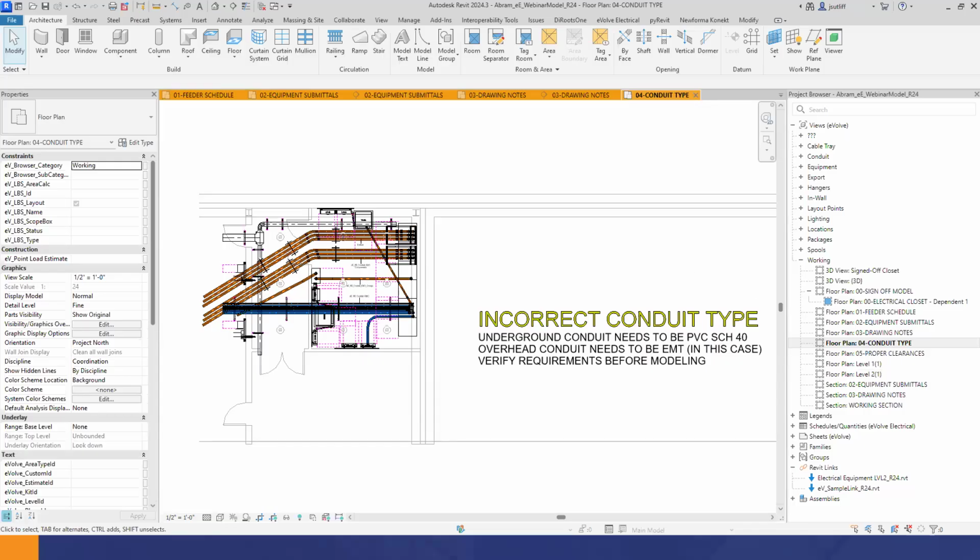Couldn't agree more. Thank you. And yeah, I would encourage you, even in this process, regardless of the size of the team, get your project team on board. Recruit one of your PEs to go hunt submittals down for you, or coordinate between the shops as far as when deliverables need to show up for field install, or talk to your superintendent because maybe the rack that you're building isn't going to fit in the door, so maybe they can leave the wall out for you, right? Those are a lot of little moving pieces there.